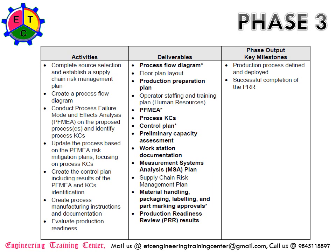The deliverables include the process flow diagram, floor plan layout showing how production is going to be done — what new machines are coming in place, how the production phases are broken down, and where production happens. You will also have the production preparation plan, operator staffing and training plan covering how you develop the competency required to meet the manufacturing instructions and process documentation, and the PFMEA. Other deliverables include process key characteristics, control plan, preliminary capacity assessment, workstation documentation, and Measurement System Analysis (MSA) plan.